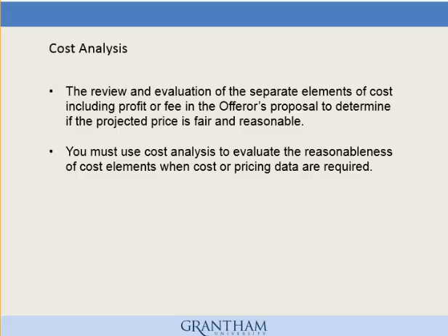The review and evaluation of the separate elements of cost, including profit or fee, in the offeror's proposal to determine if the projected price is fair and reasonable is the act of performing a cost analysis. You must use cost analysis to evaluate the reasonableness of cost elements when cost or pricing data are required. You must perform a price analysis even when you perform a cost analysis. And assuming the reasonableness of individual cost elements does not always assure the overall price reasonableness.